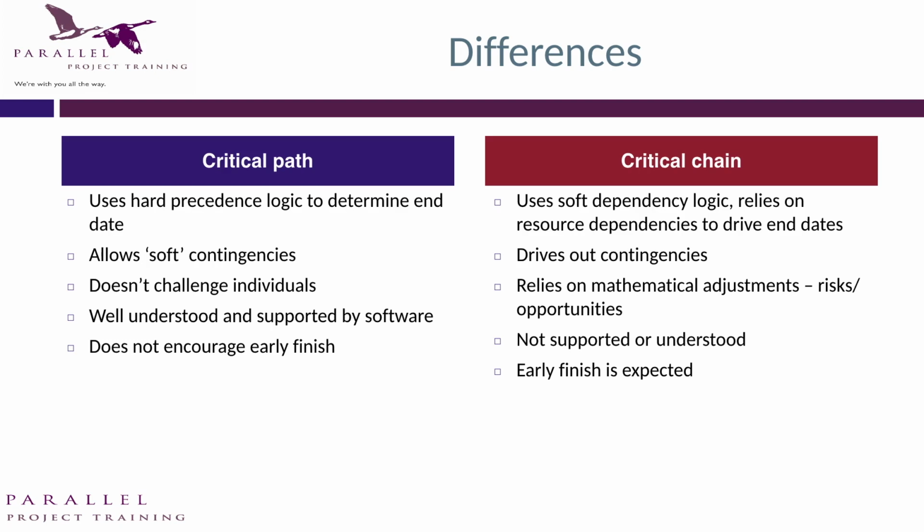We usually ask people for 3-point estimates, best, most likely, worst case, in order to produce that estimate, the best estimate, the duration. Software can be more difficult with critical chain, and usually we're aiming for an earlier finish. You know, we've got this relay runner work ethic within critical chain, which is targeting let's finish as fast as possible, really. Not finish by the target date, but finish your work as quickly as you can. So it's a significant difference in culture.